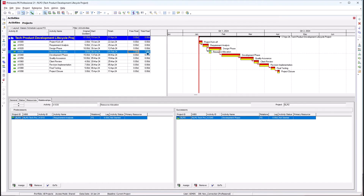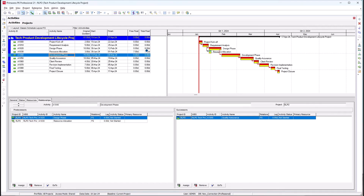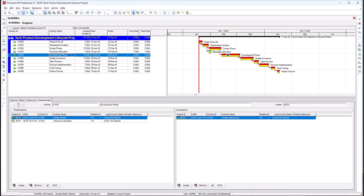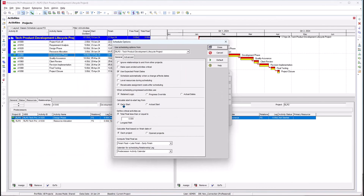In terms of free float, it's saying the duration of time you can delay this resource allocation activity without delaying the next activity is seven days — without delaying the successor, the development phase. So I can wait seven days without impacting the development phase activity. The total float is the duration of time you can delay an activity without delaying the project end date — in this case it's the same value. All these activities are finish-to-start. Now let's check the scheduling option to make sure we are using retain logic — and yes, we have retain logic as our scheduling option.